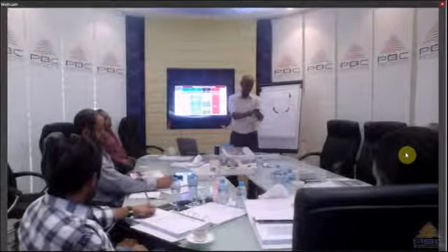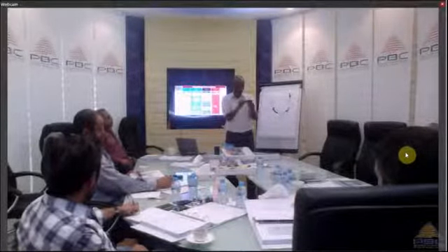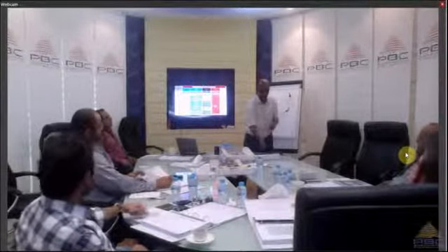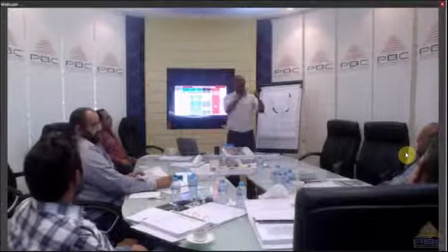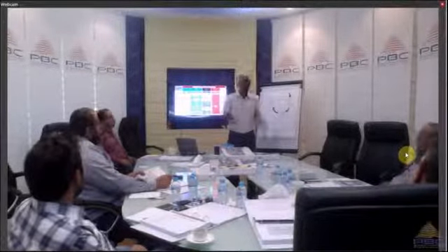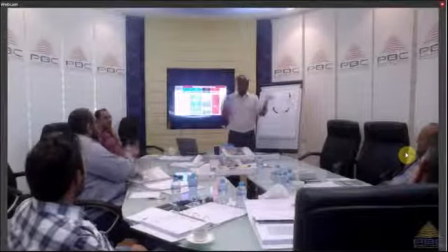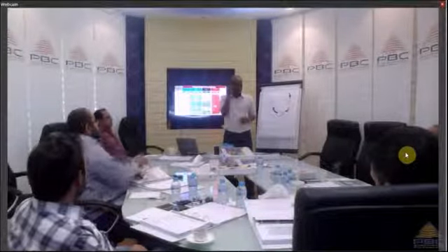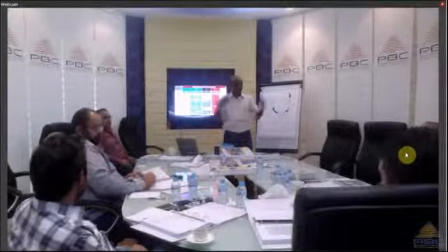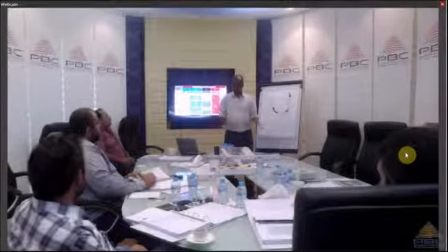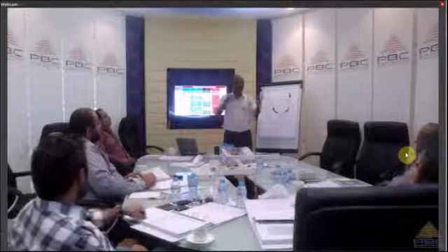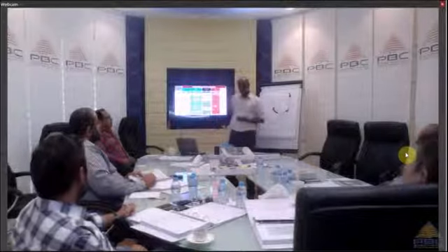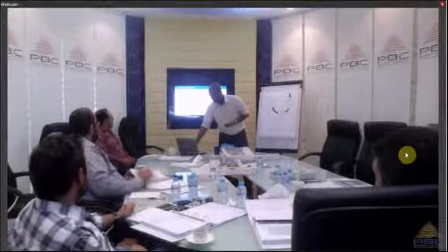Now, you're going to give me this phone with the description. We agreed on the testing, but are you going to give me the phone like this? Or it should be a presentation. So it should be in what? In a box. Proper presentation. Maybe with an extra battery, maybe with accessories, right? We call this what? Deliverables. So what are the extra things? How are you going to present the final product to me? All these are components in the scope statement that we tend to overlook.